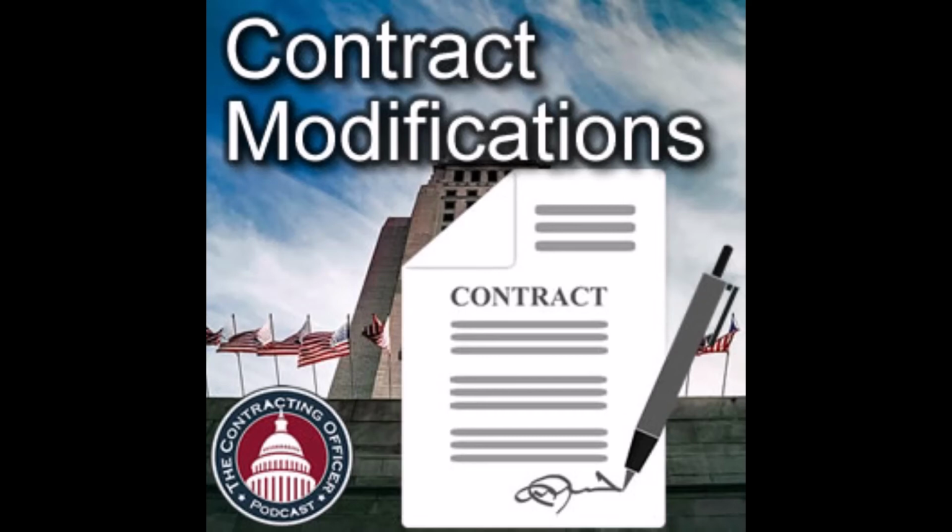But if you have 3 or 4 changes and you're negotiating the total price for all those changes at once, maybe it works in your favor, and the government's opinion on one is opposite of the contractor's opinion on that one, but also they're on opposite sides of another one, and it all washes out, and you come to one happy deal on the total price for all the changes. So sometimes combining things could be good, but it does make it more complex.